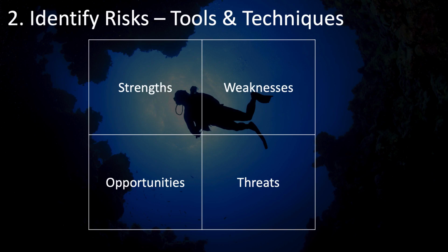SWOT analysis is simply picking an idea or subject and then identifying the strengths, weaknesses, opportunities, and threats related to it. You could do this for your project and the approach you intend to take on your project to help you identify different risks.